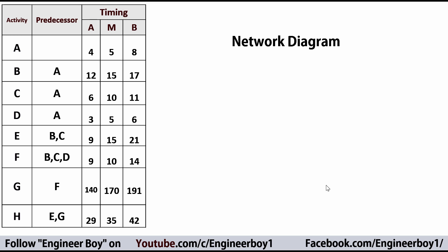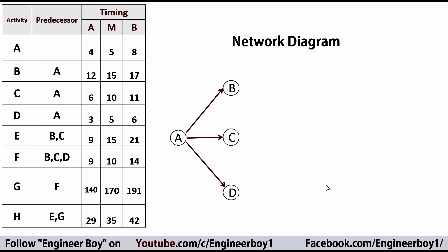In the network diagram, activity A is just the start of the project — it is the predecessor for B, C, and D. So once activity A completes, B, C, and D start. Then B and C are predecessors for E, and B, C, D are predecessors for F.